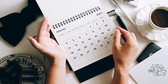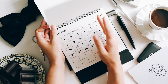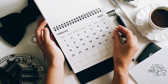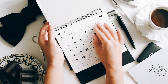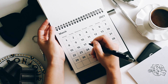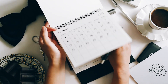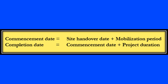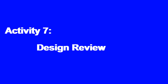Activity number six: preparation of the master work schedule. You need to review the estimates and schedule prepared during project bid or negotiation time, based on actual facts on the ground. Once site handover is done and mobilization is over, you will identify the critical path of your project all the way from the commencement date to the completion date.